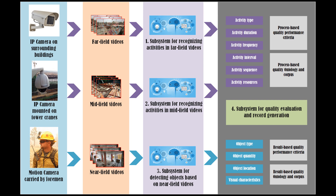PI treats the estimation from two perspectives: processes and results. Process-based quality control detects if construction operations follow their method statements. It will check activity types, durations, frequencies, intervals, and sequences.